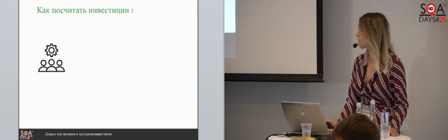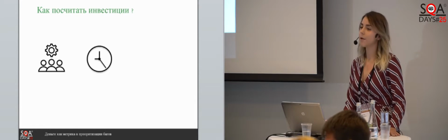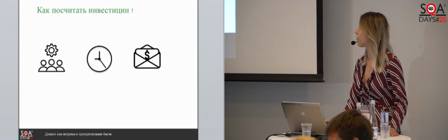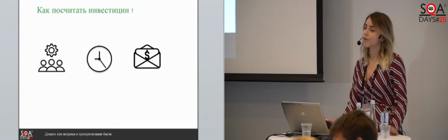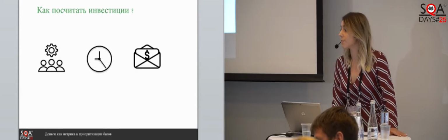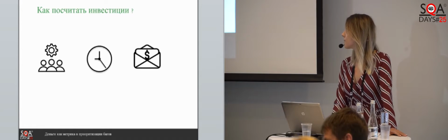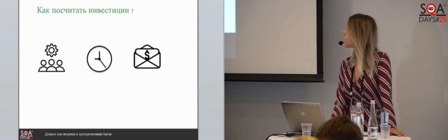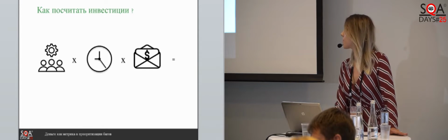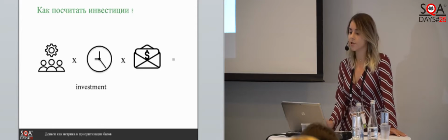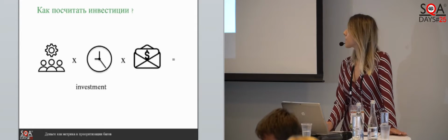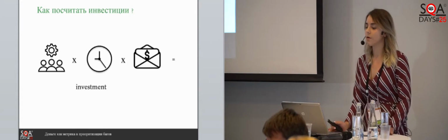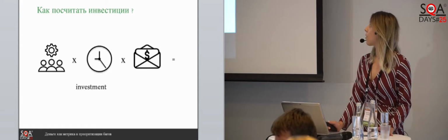In order to calculate the investment amount, we need to understand how many testers will be responsible with the bugs fixing, how much working time they will spend, and what is the daily salary rate of a tester. I'm not sure whether you would like to share the amount of money paid to you. Just take an average, and when you multiply everything, then that'll be the investment. After that, you'll have to calculate the net profit.